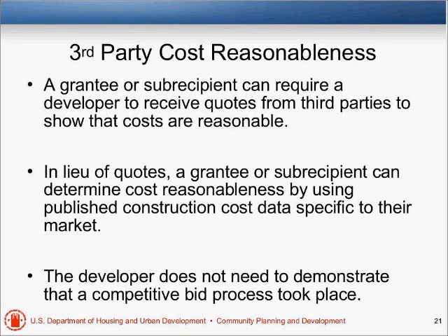Well, developers don't. John, you want to jump in? Go ahead. Okay, I was just saying developers don't have to have a procurement policy, but in order to assure cost reasonableness, you can have them get quotes. But they don't have to go through procurement as per OMB circulars and through the CDBG regs.